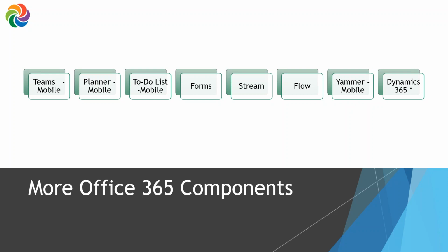You create a project plan. The project plan has buckets for different types of tasks. So I think during my Planner webinar that I do, we talk about having a birthday party. So we're going to create a plan for the birthday party, and one of the buckets would be, we need to find a location. So there's a bunch of tasks that would be in as far as finding a location, like we need to determine how many people we're going to have, and do we need a kitchen in the location, and things like that.